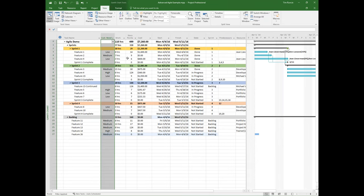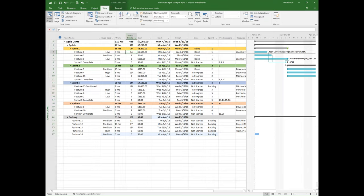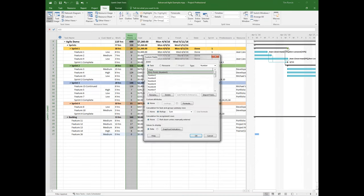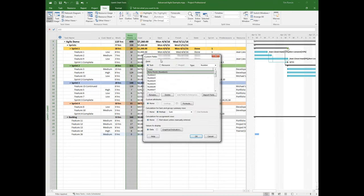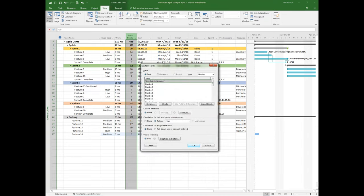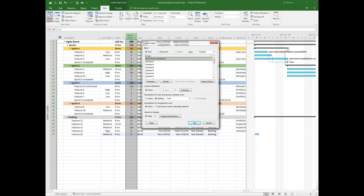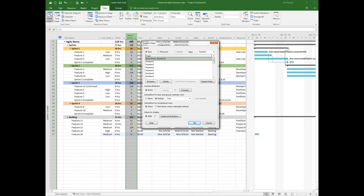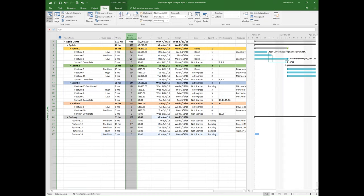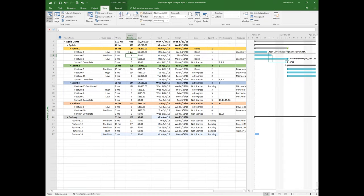Also, if for some reason you decide to throw a new feature on the backlog or you have something that you're working with, I'm going to say this is feature 26 and you'll notice the default value came right in. So make yourself and make project do the work for you. So if you typically start with a priority and it's in the middle, you can strategize around that. Now, with custom fields, the same goes, for example, story points. All I did here to go to custom fields is I took a number field because I do want this to roll up. I want to put a burndown to show, am I doing the work? Am I completing these activities? How many story points are remaining in a sprint?